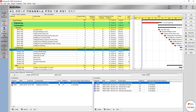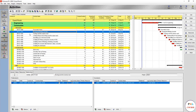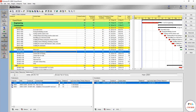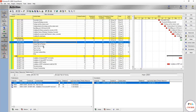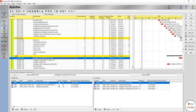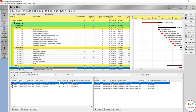Similarly, concrete can be excluded or you can just do a pre-qualification for the supplier of the mixer. The most important items here are the porcelain tiles and ceramic tiles — these are the two main materials to include. Also, if you have MEP equipment, these are the major long-lead items, especially if you're working in a country where the materials or equipment are manufactured in a totally different country.